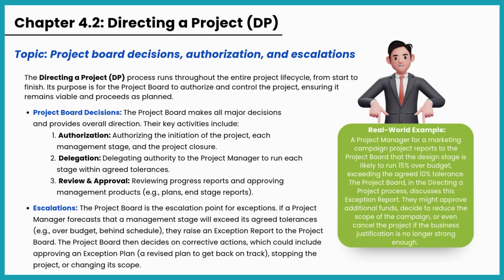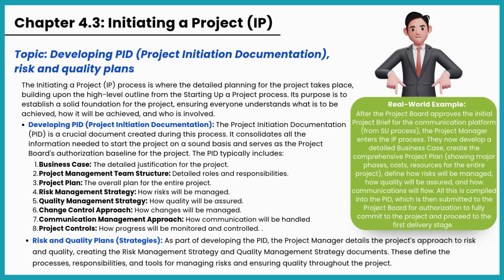Initiating a project is where you do the deep dive into planning. It's about building a robust foundation for your project. The most important output here is the PID, your Project Initiation Documentation. This is your project's constitution, detailing everything from the business case and overall plan to how you'll manage risks, quality, and communications. It's the project board's go-ahead document for full project commitment.